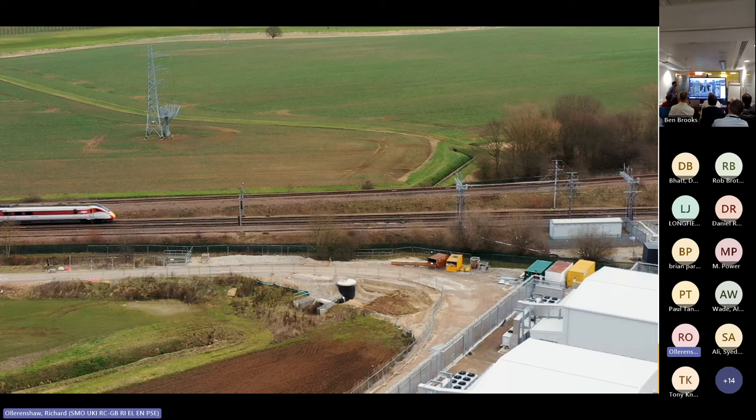These are what we call air-core reactors. They have magnetic clearance around them. We have to make sure that the compound fencing was outside that. We are working with tight spaces, very tight space. When we purchased the land from the farmer, we were constrained in our purchase boundaries, and that dictated the constraint on our design.